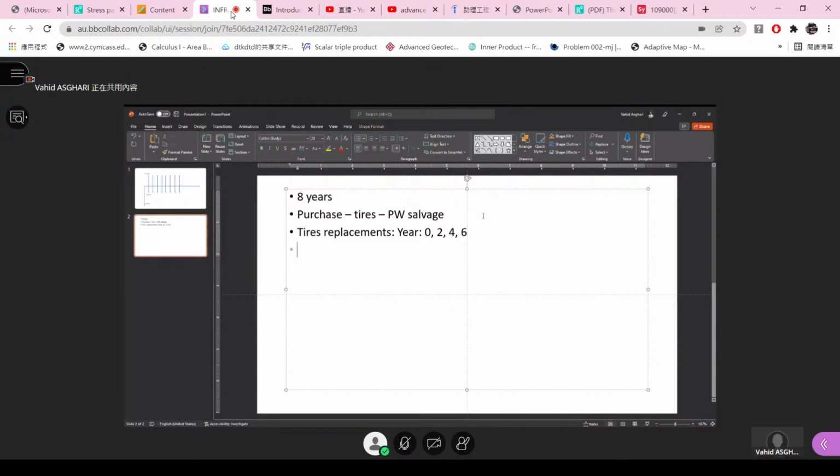You probably need to use the present value of those costs. And the next part will be finding the annual costs, right? The major repairs will be needed after 8,000 hours of operation at the cost of $60,000. So at year 8, $60,000.